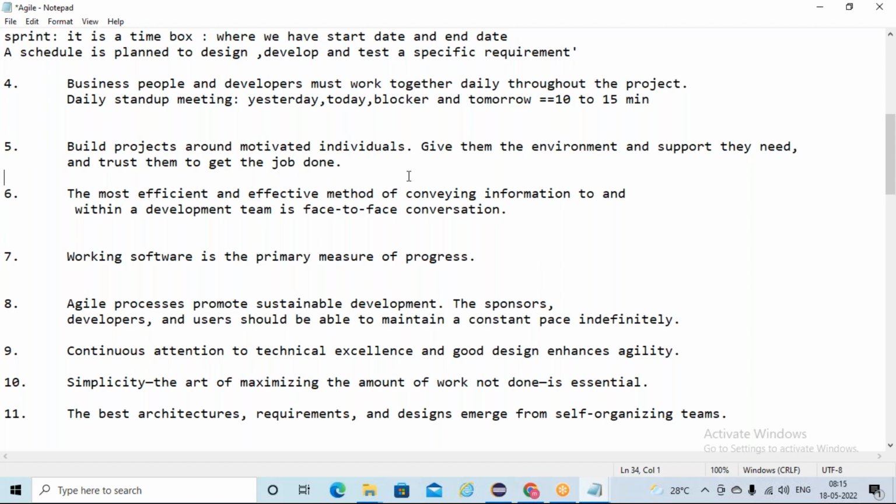Enough time means we'll go with story points. Like you take one story, I'll ask the developer, hello developer, how much time do you want to complete it? In the grooming sessions, we can have story points while understanding that application or user story. The developer will understand that user story and say, yes, for me it takes 2 days. At the same time, the tester also says, for me it will take one day to complete. So how much in total? I will take the average, so overall 3 days for this user story we will plan. That is fine, so that way we go.